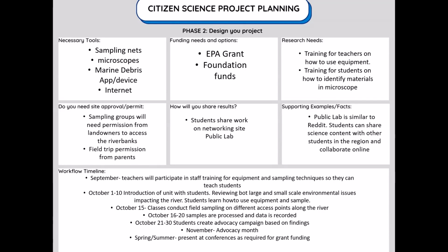to students. And then after getting permission from landowners to access the waterway, we were able to schedule transportation to take the students out to the sampling location. And that allowed us to plan out when students would need to access the school labs to process specimens. And then further on down the line, it allowed us to plan as an organization when we would be able to present our findings at conferences as stipulated by the grant.